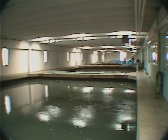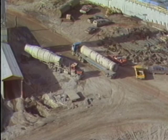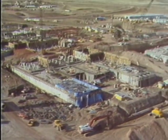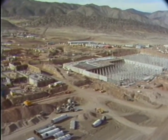Without Denver's rationing program, projections say that use would be in the range of 600 million gallons. That's over 1 million gallons a day more than can be treated. So the solution would be another treatment plant. Well, it was back in 1977 that the Foothills Water Treatment Plant was to be in operation. However, 5 years of litigation due to environmental questions and then a construction strike last summer has pushed the completion date back. Foothills should be completed by this coming September, but that won't help this summer.